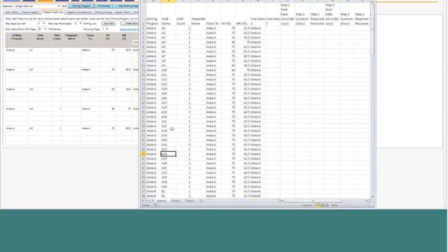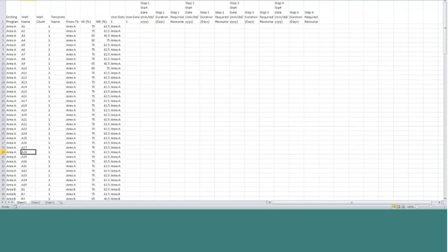So if I get, for example, a drilling schedule that has multiple different facilities, where different wells are targeting different areas, and this is mostly used for areas, I can actually just create one drilling schedule and have my area A, B, C, and D programs in here, and it's exactly like my previous program. I'm still specifying the well names, specifying count. I'm not specifying template because that's done at the program level, but I can specify my template here if I wanted to, and I can specify working interest, NRI, and what they flow to, and all that.